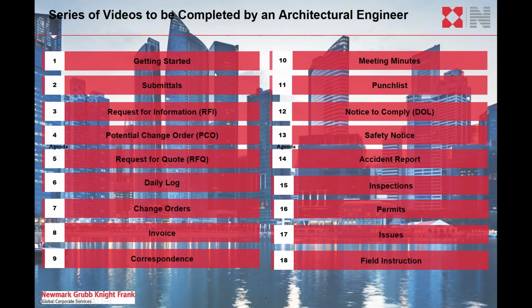You should have gone through your getting started. Your submittals will identify how they are routed through the system. They are initiated by the contractor. The SRE will receive them as the manual approver or through the routing that was identified by the SRE through the application. And we'll also identify today how to reroute this to someone within the approval chain. So we'll go ahead and get started.